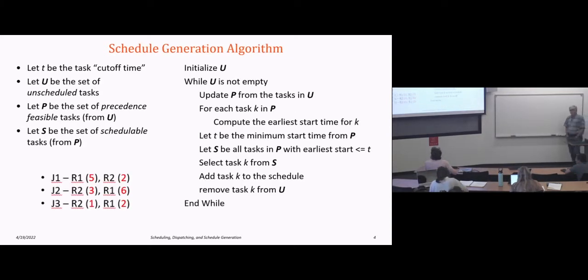We talked about schedule generation and this basic process, leading up to the fact that simulation-based scheduling is very similar to an implementation of schedule generation. The whole idea of schedule generation says I have these sets of tasks. I have the set U of unscheduled tasks. I have a set P of precedence feasible tasks. So from my set that are unscheduled, I have a set that are precedence feasible.